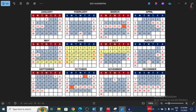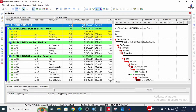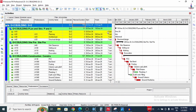For February, the holidays are on 2nd, 8, 9, 16, 22, 23, and 26. For March, holidays fall on 2, 8, 9, 10, 11, 12, 13, 14, 15, 16, 22, 23, and 30. Similarly for subsequent months. According to our assumed G+2 calendar in the previous video, the planned duration for the project was 191 days, starting from 2nd December and ending around 13th August. We will assign this new calendar and see whether the project still completes in 191 working days.